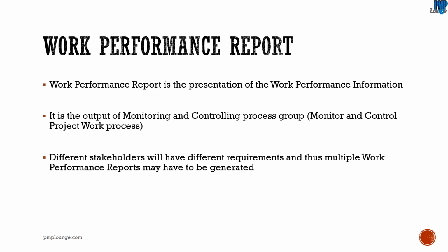And as always, it's important to understand that different stakeholders will have different requirements about the information that they need, and that is why multiple performance reports may have to be generated. A program manager or a portfolio manager, a person at that level, would like only mathematics and figures and the information that says that we are 5% behind on code and what our steps to take to fix that are. That is all that a program or portfolio level manager would be interested in.